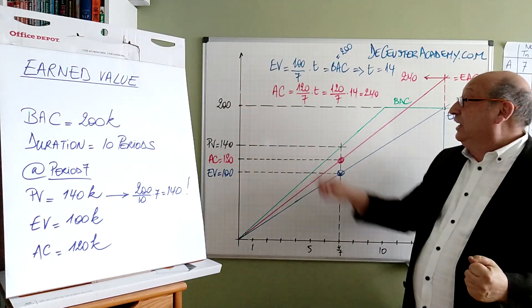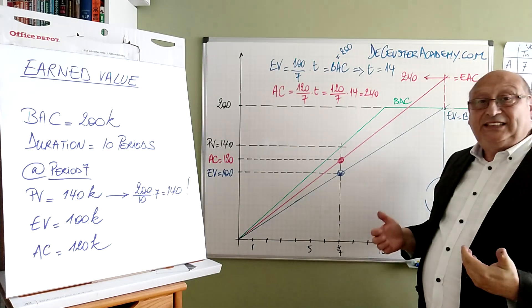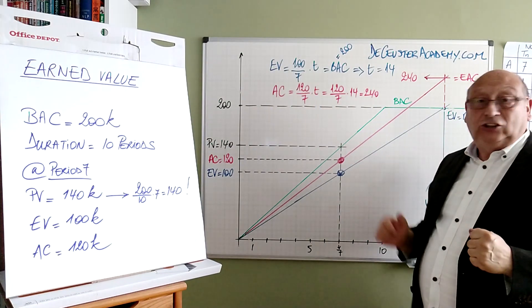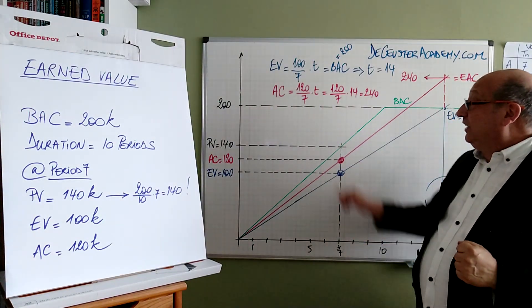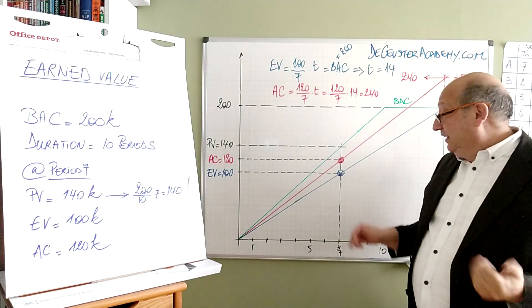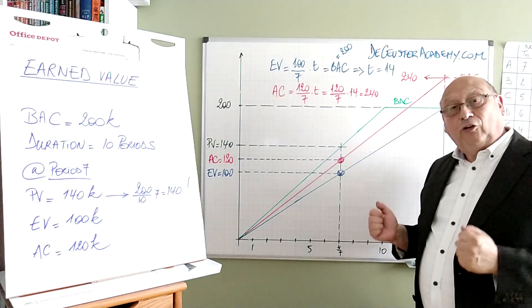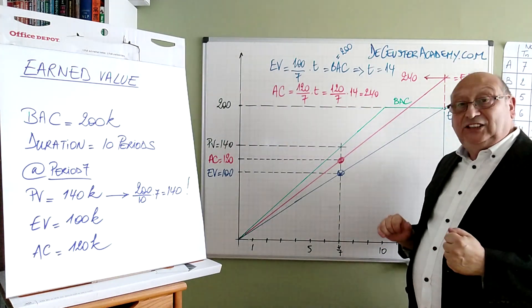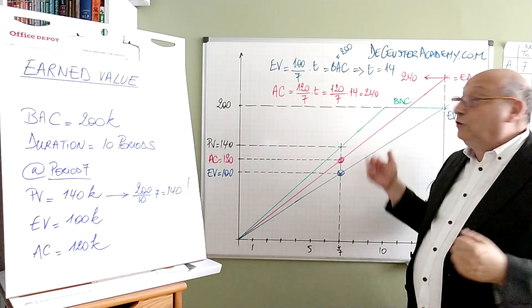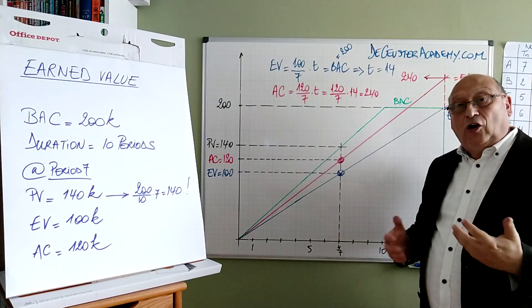We can say that the actual cost is 120 divided by 7 times T. 120 divided by 7 is the slope of this red line. T is the period when we apply it. When we say we continue till period 14, we replace T by 14 and we see it's times 2, so it's 240. So the estimate at completion using the earned value method will be in this case 240k.